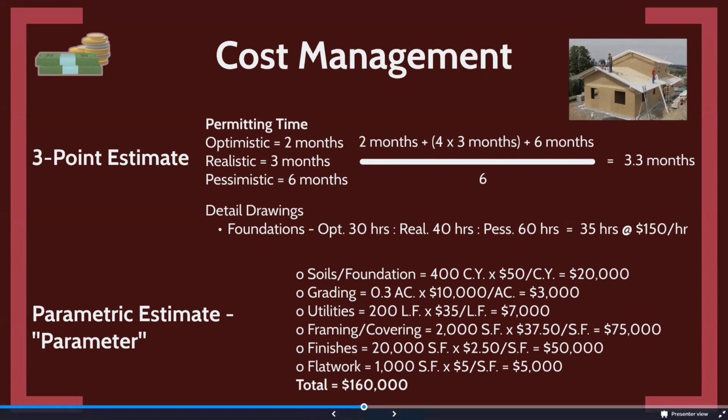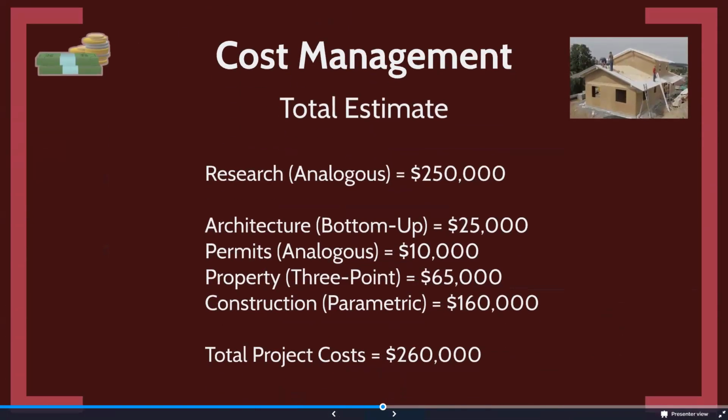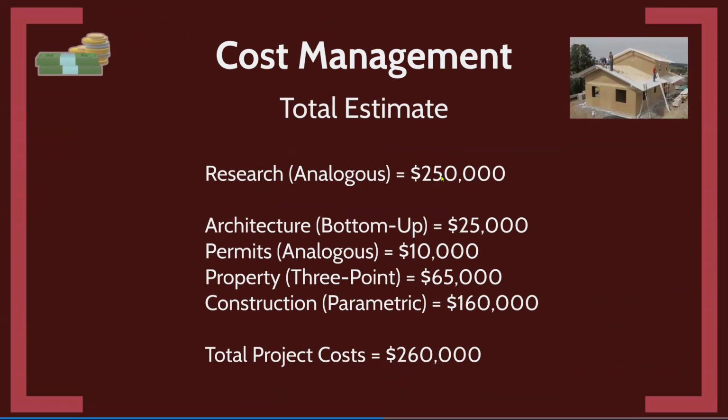Okay, so that's all the different types of estimates. And really what we do all the time, right, in order to develop estimates for our projects, is that we use a combination of these. So in the very early stage of a project, we might use an analogous estimate where we go and find similar projects.